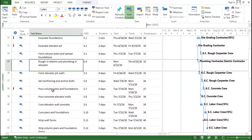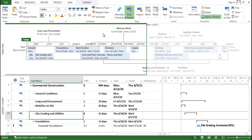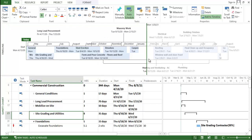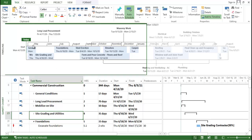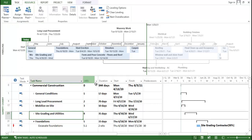Once you have typed all the tasks, WBS, durations, and predecessors, the entire scenario is reflected in a detailed timeline view. This timeline helps you identify — for example, long-lead procurement starts here and ends here, covering this amount of activities. You can see which activities are planned for a given month and which continue into the next.